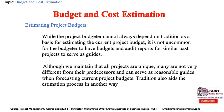A more interesting estimation technique that also depends on actual costs early in the life of a project is based on earned value analysis. Early actual costs on a project are compared to their estimates and the remaining costs are adjusted by assuming a constant actual-to-estimate cost ratio. This assumption of a constant ratio gives the lowest average estimation error — 11 percent — of the five different predictors tested. For multi-year projects, another problem arises: the forecast resource usage may be altered by the availability of alternate or new materials, machinery, or personnel available at different costs than were originally estimated.